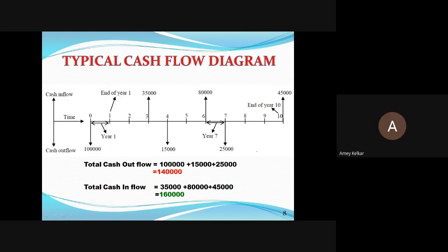Yes, correct. For that particular period of time, we can have control on the cash outflow. Because as Shabaz rightly said, during the casting of the slab, expenses will be more because more labor will be coming. We want other things such as water and electricity, and mixers will come. All those things we have to do. And for some things we have to pay instantly. So at that time, our cash outflow will be more. So if we get cement on credit basis, at that peak point of cash flow we need not pay the cement dealer, and we can keep a check on our cash outflow.